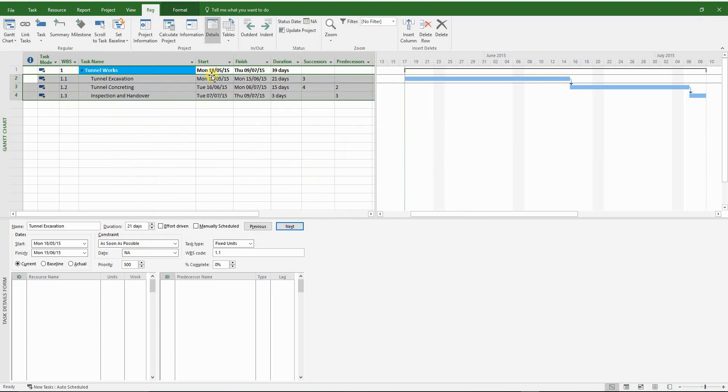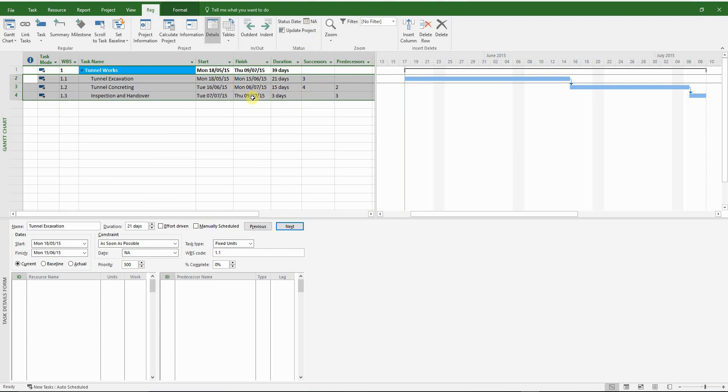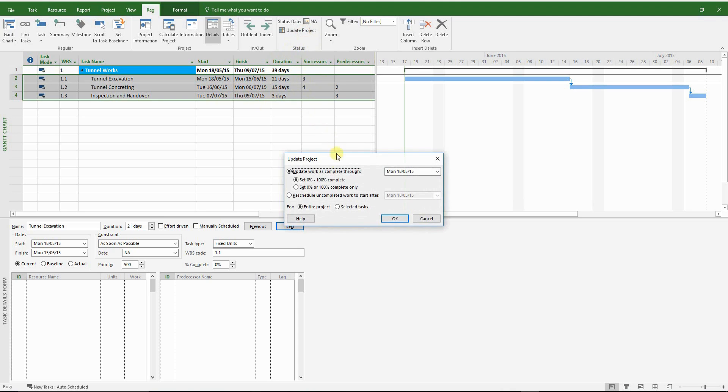Everything looks good. The finish date has not changed. It's extremely important to check the finish date and milestones to make sure that there haven't been any critical changes to the program after removing constraints.